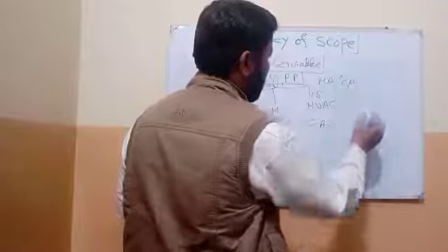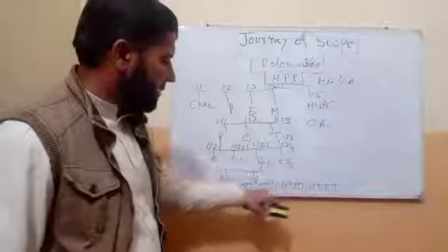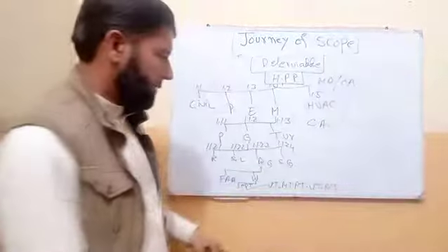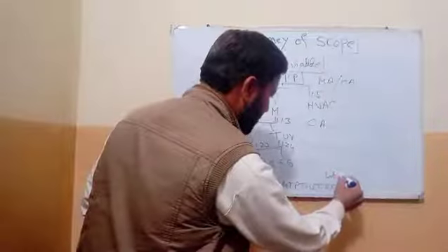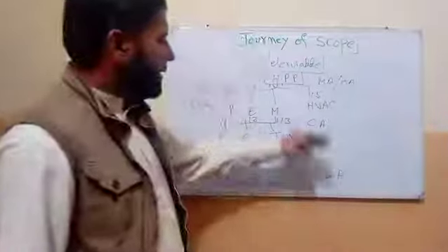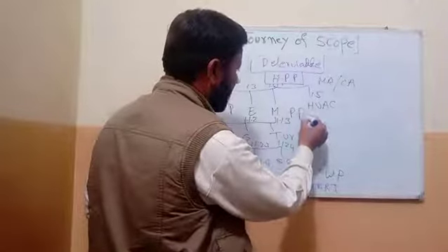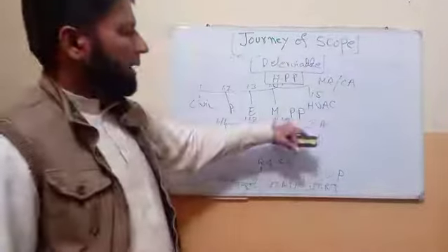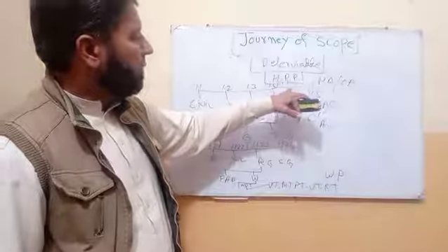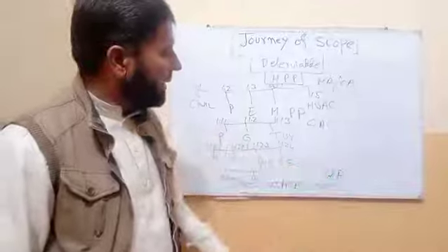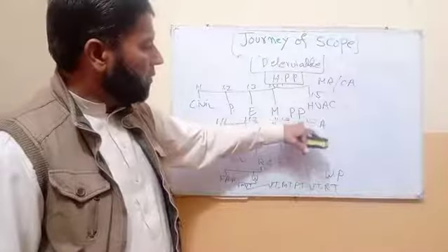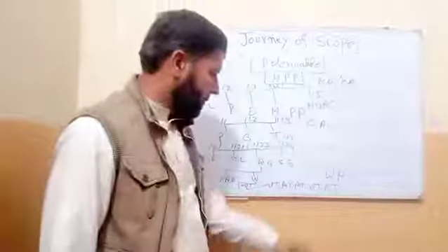Control account or management account. And the lowest package is called a work package. In between, we call it a planning package. Mostly the planning team deals with the planning package. The highest is called a management account or control account. The lowest is called a work package, and in between is a planning package.